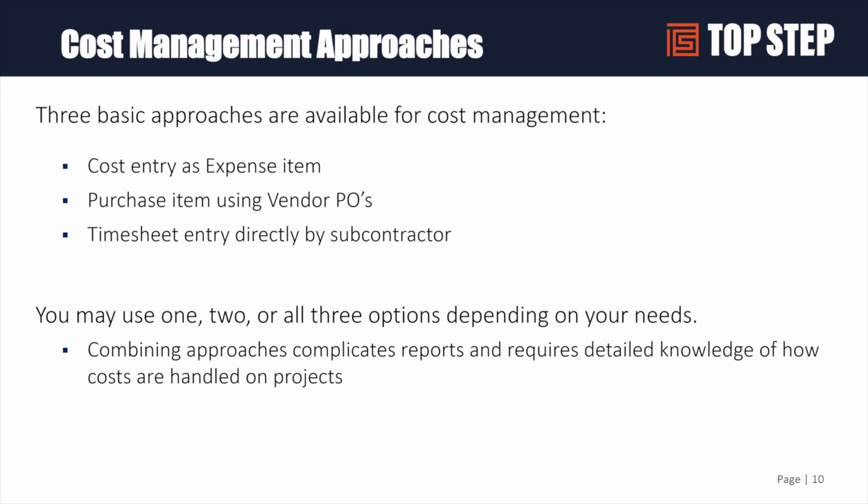And we have customers that have all three approaches deployed, where they'll have some subcontractors that are providing hours, some contractors that are coming in as fixed fee, and they need a combination of these approaches to be able to get the right costs into the system. One thing to note, if you are entering time and bringing in purchase items or expense reports, make sure you're not double costing your projects and you're excluding one cost or the other, because you don't want to double cost your project and skew your margins.